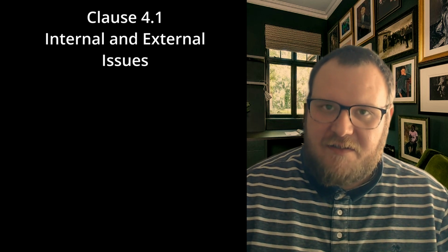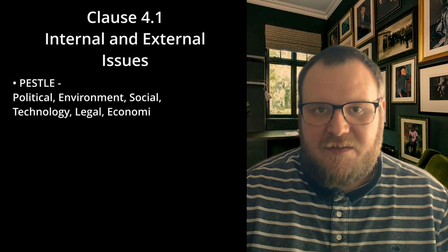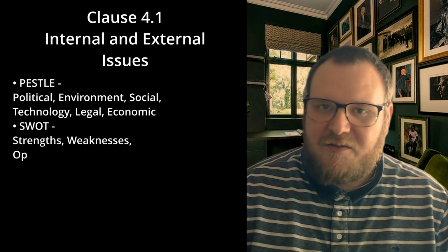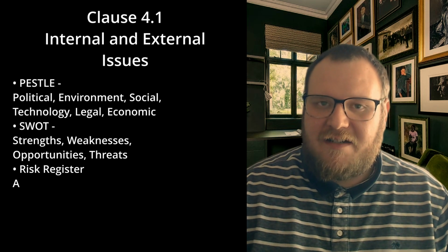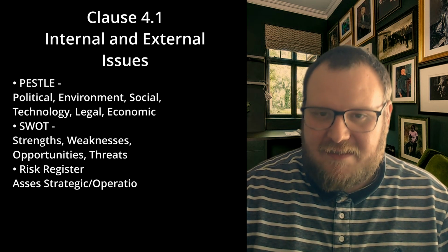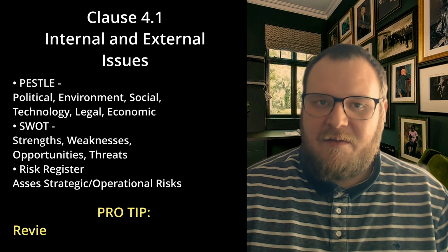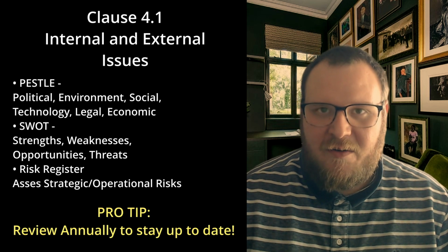Now, there are a series of tools you can use to do this. One would be a PESTLE analysis, which you'd use for external factors. You can use a SWOT analysis to evaluate your strengths, weaknesses, opportunities, and threats. And then, of course, you have your risk register where you'll capture and assess any risks involved in any of these issues. Now, here's a tip for you. You need to review these at least annually or when a major change occurs to ensure that they always stay relevant and up to date.